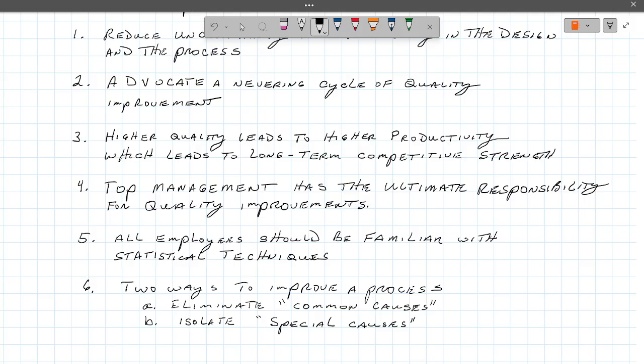So Upstone is making concrete for us. Their little trip lever that's supposed to drop the cement into the process, and then the other trip lever that drops the stone aggregate in, and then we're going to add the sand with it. But one of those three has something stuck in there. They didn't clean the thing. Okay, so a common cause would be poor cleaning, so that the little gate didn't open right, so it didn't pass the same amount of material through that it's supposed to. Okay.